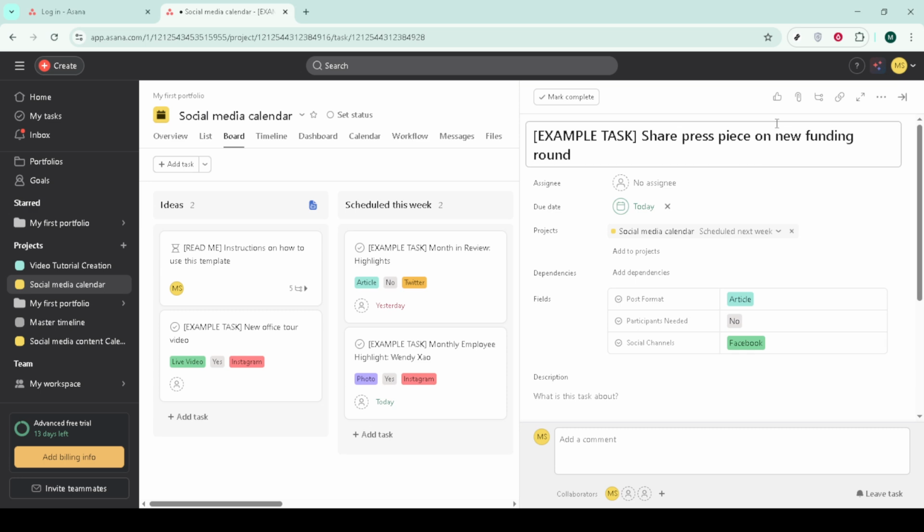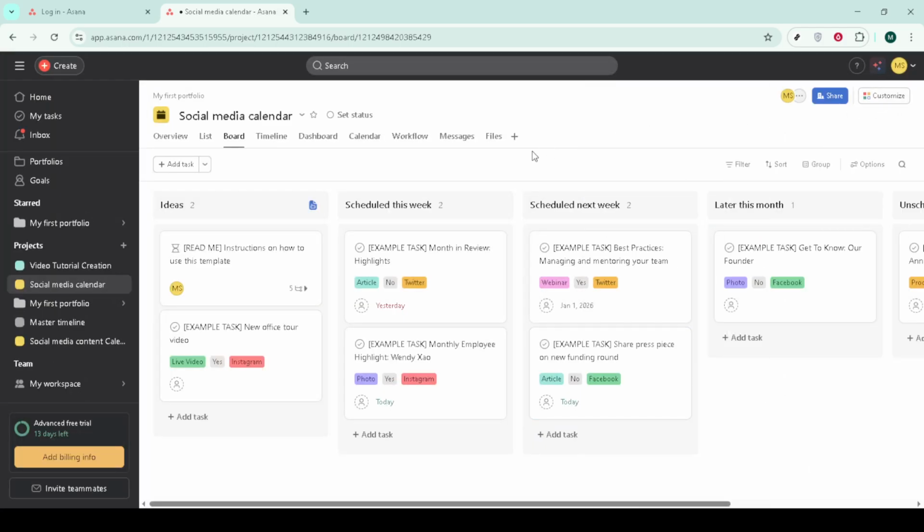Use the sprint board in stand-ups to review progress, surface blockers, and plan the day's work. At the end, use the completed sprint board to walk stakeholders through what shipped. Then hold a quick retrospective, analyzing what went well and what didn't, using the completed tasks as context.